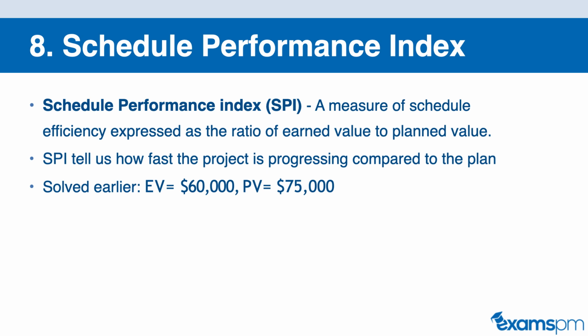Now, using our previous example of the Windows installation, we can now do an example where we calculate the SPI. So the formula for SPI is earned value divided by the planned value. Because we're getting the ratio here instead of earned value minus planned value, which is what we saw in the schedule variance, we're dividing here instead. So whenever you see index, remember that you are dividing.